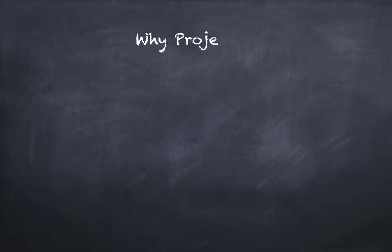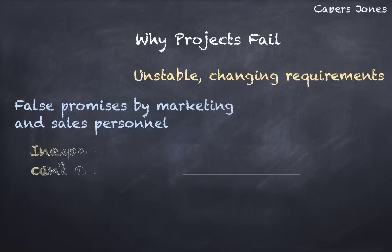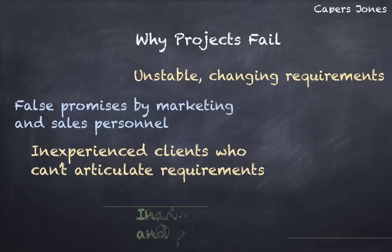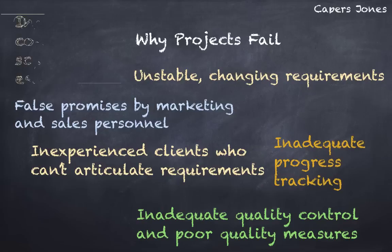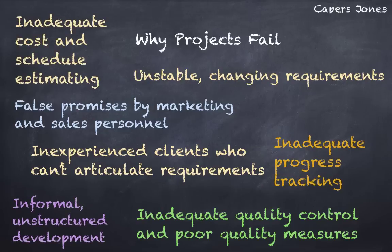Some of the biggest problems development organisations face are poor requirements. They might have too few or even no requirements. They might have enough requirements but they conflict, overlap, or are just plain wrong. And then there is the dreaded gold plating, where the project adds additional requirements or features they think the customer will like, and the effort required to meet them simply isn't worth it.